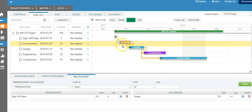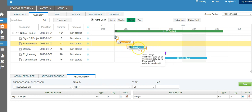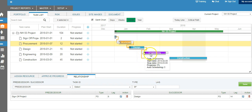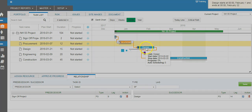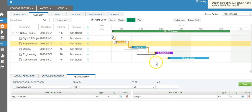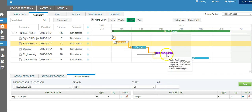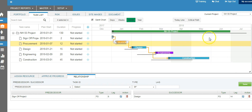Once we establish all the relationships between the tasks, you can see the relationships listed underneath as well. Now, say the design activity got delayed. Because engineering and construction are related to design, those bars should also move along with design. If we move design to a later date, you can see engineering and construction have also moved out of the original plan date. This relationship helps us identify what the project finish date will be based on the current state of the project.